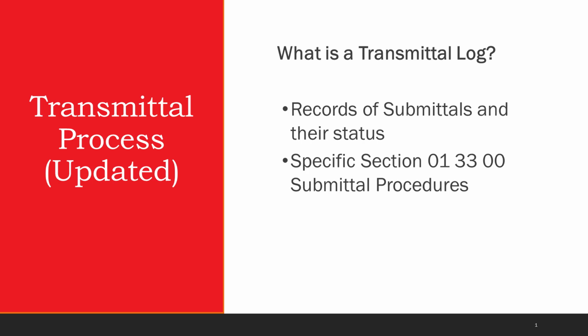Today we will discuss how to add and complete a transmittal. The transmittal log maintains the record of submittals created and their statuses. All submittals must be made using a transmittal form or ENG form 4025 generated in RMS3. See specific section 013300 submittal procedures or equivalent for a detailed explanation of the submittal process and requirements.